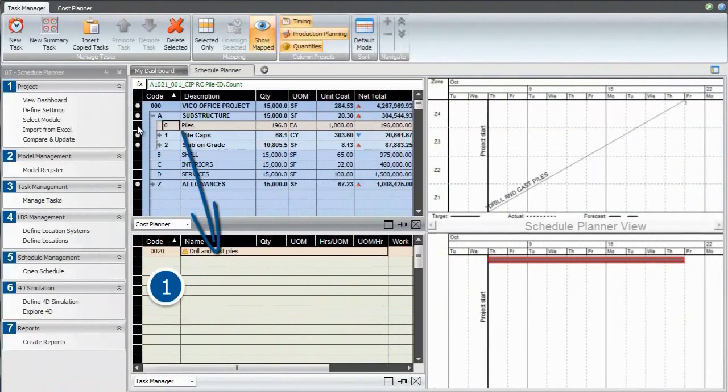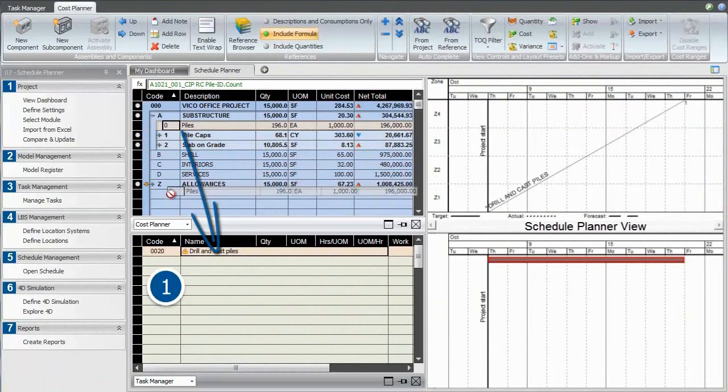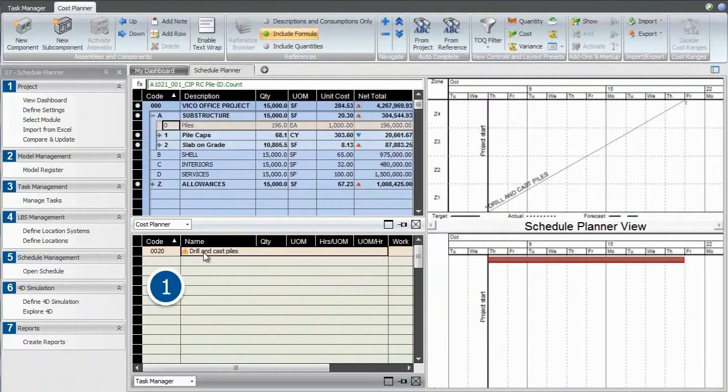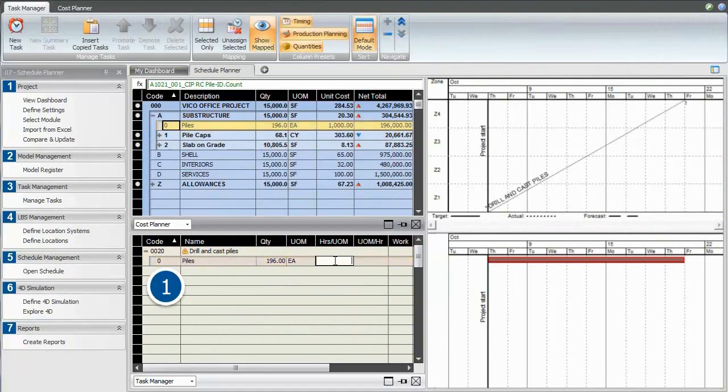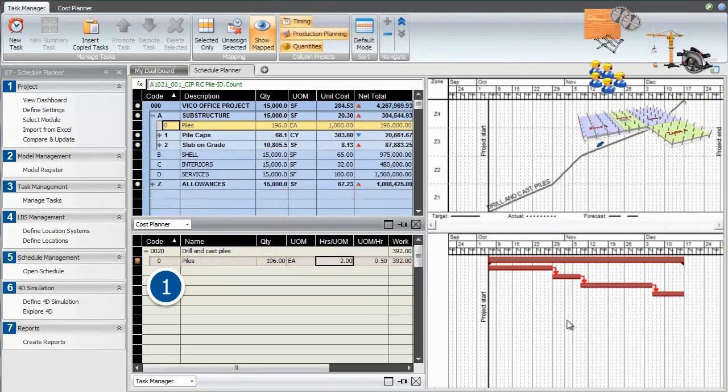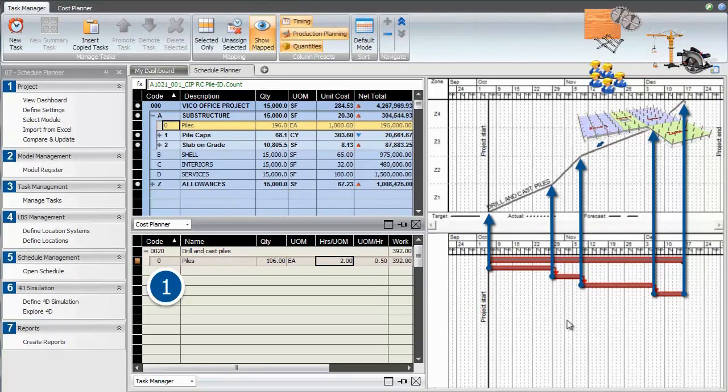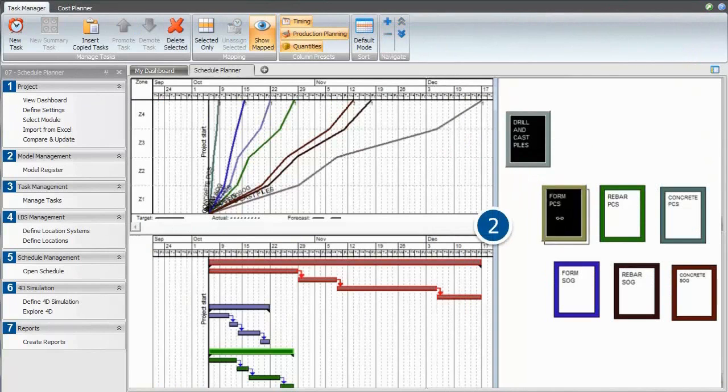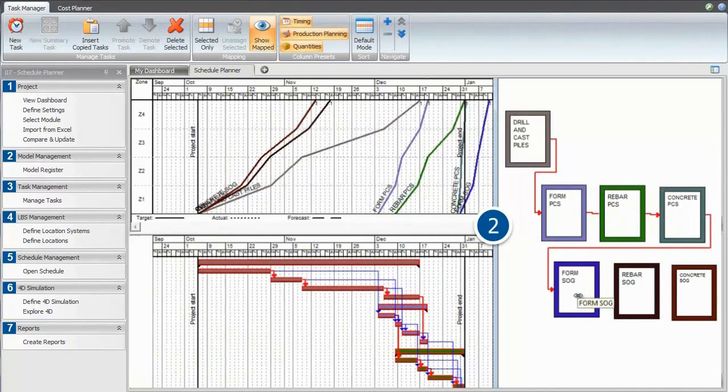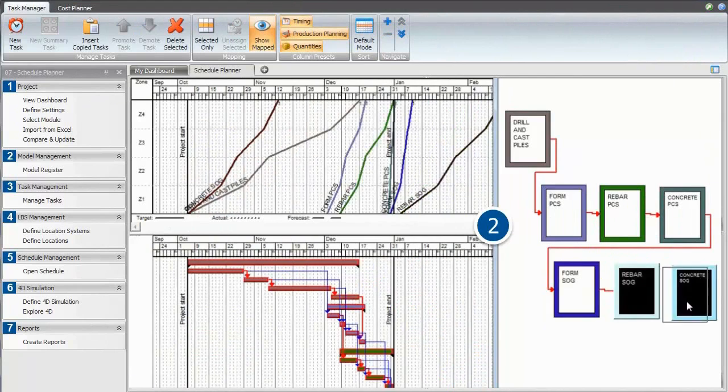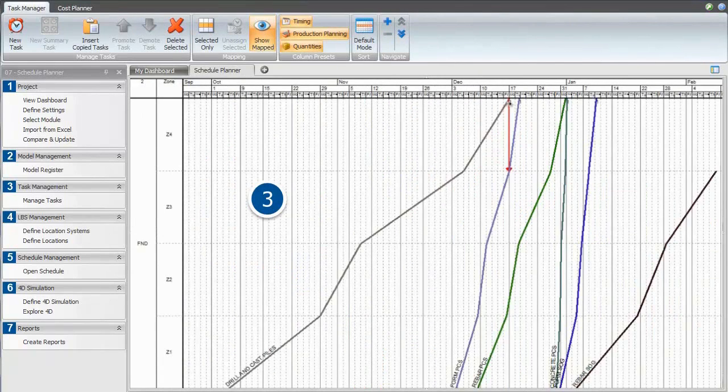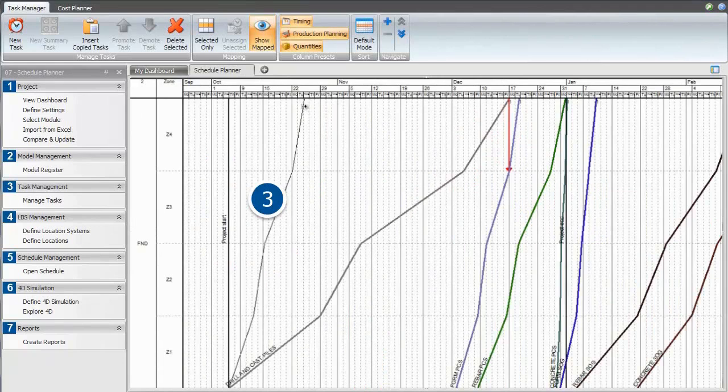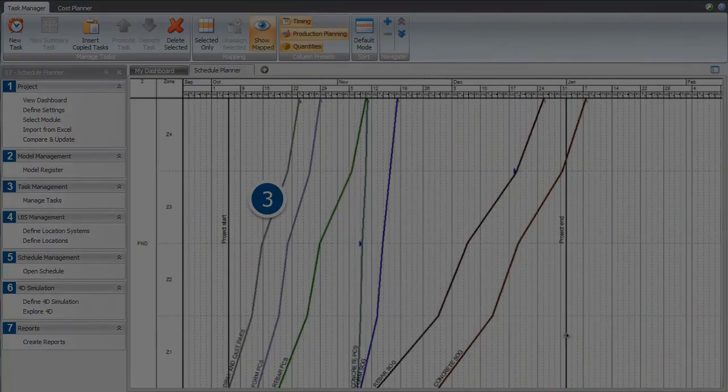The next step is to leverage our estimating quantities, costs, and any resource data to load the schedule. We drag and drop the cost line items into schedule tasks and see how the quantities and productivity data now drives the schedule durations. The location-based quantities drive location-based tasks, which can be manipulated in both the flowline and the Gantt view. We define trade logic, which is automatically copied to all relevant locations, and balance the schedule around the bottleneck trades by simply dragging and dropping the lines. The system will tell us what manpower is required in order to meet the desired pace.